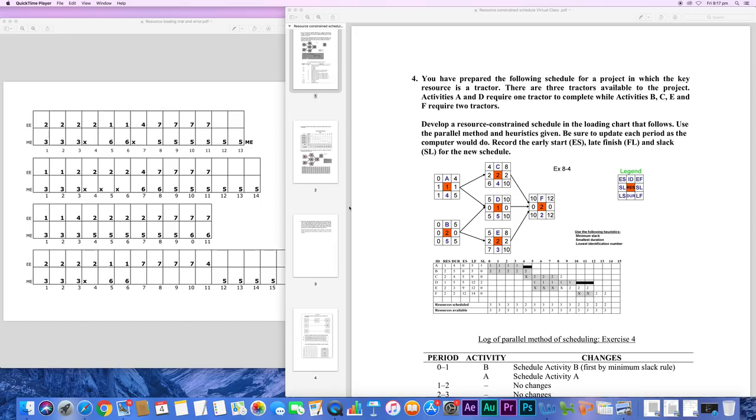In terms of scheduling resources when there is not enough of them, for example, a planner has planned 2 or more activities to run in parallel, considering that he will have enough resources. However, that's not the case. The same resource does 2 or more activities that are scheduled in parallel.